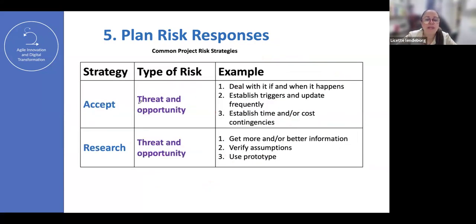And there will be a couple of things that are neutral, both threat and opportunity. Sometimes you have one type of event that is both a threat and an opportunity. In those cases, you can accept the threat or the opportunity, or you can escalate, like research. Boom, let me ask my supervisor what to do. Those are in addition, so you can say, okay, I'm going to accept and I'm going to research just in case.